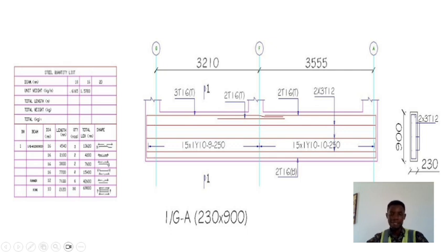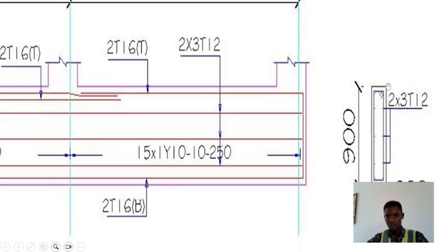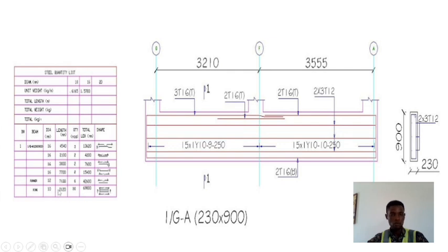The 140 is just like a constant in my head now. Understand? Since it is having four bends here, let me zoom it, and the 135 degree is here for the hook length. So I have a total of 2120. With this, I'm going to have my bar bending schedule. This is the only job I'm doing. When I present this drawing to my iron bender, he's going to know what to cut and everything to do, and it's going to help me know the reinforcement I need for the job as well.